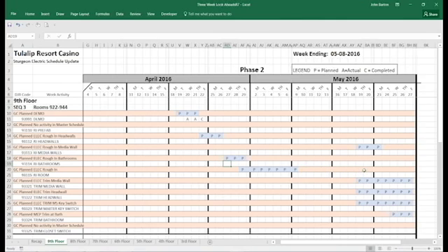Because the way they've done it, and that's one of the intrinsic problems of this project, is they're letting you have 2 floors at a time. Now, if you had 4 floors, you could keep a workforce fairly stable. But when you only have 2, it's pretty hard to keep all of your guys working to where you got 6 guys, maybe 8 guys working full time, and you're not having to pull them in and pull them out. But in this case, that's not the deal.